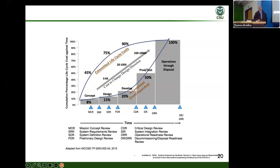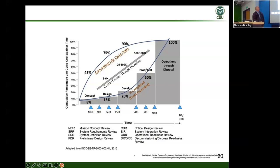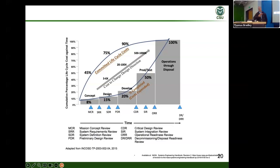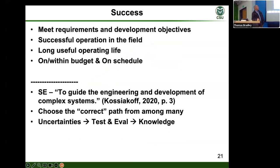You don't commit more to a program until you have good confidence that you are in a good position to step off to the next stage. There are a bunch of reviews depending on which acquisition cycle you're in — DoD 5000.02 series has A, B, C variants, and NASA has similar ones, a little different. It doesn't matter which one you use; they all generally prescribe some kind of review process like this.